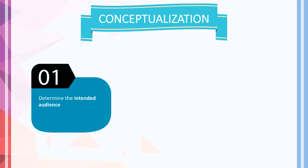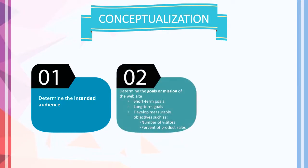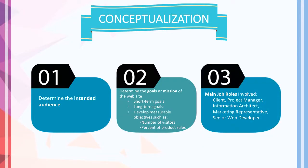For conceptualization, it is to determine the intended audience, the goal or mission of the website — for example, short-term and long-term goals — and to develop measurable objectives such as number of visitors and percentage of product sales. The main job roles involved are client, project manager, information architect, marketing representative, and senior web developer.